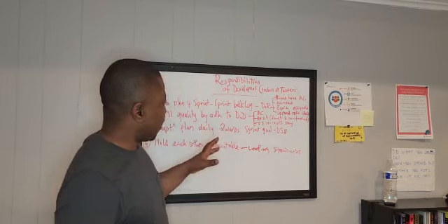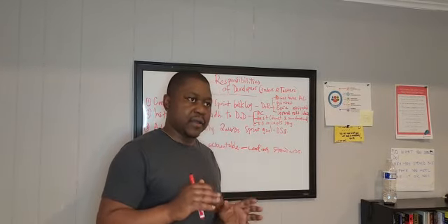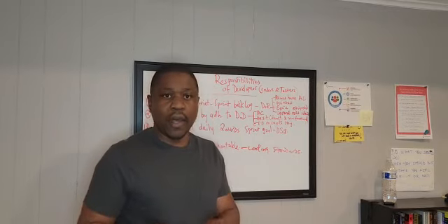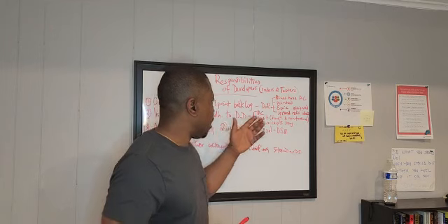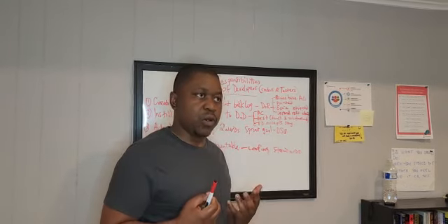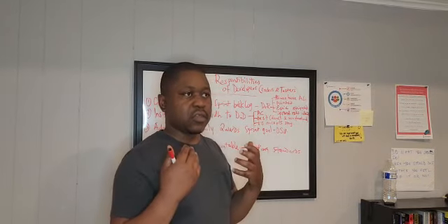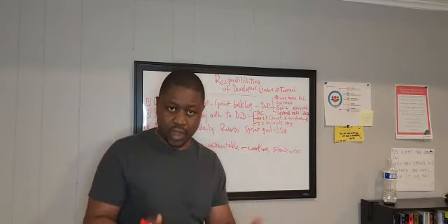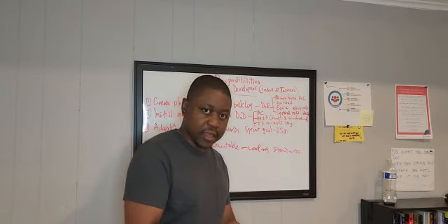So the developers are now going to make sure that these stories that they are committing to work on, as suggested by the PO, meet the definition of ready. At the bare minimum, the stories should have all the information necessary that they can actually start implementing.